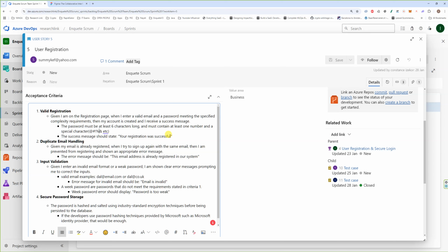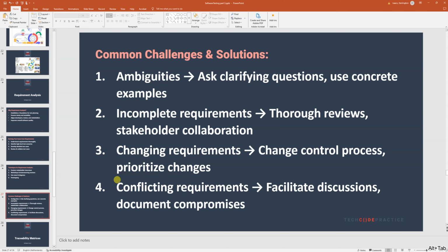You understand? To bring it back to Ifeanyi's freelance work, which I think I've discussed with you before. If someone has said, "This is the stuff we need in our website, we want this, we want that, we want you to put this here, we want you to put that there," and you write a proper document and say, "Is this actually what you agreed you want?" The person is like, "Yeah, yeah." You have to also make the person understand that should you come again tomorrow and say, "This thing should move there, that should move there, I want the database now to be two instead of one," it comes with extra costs. That is you performing a proper change requirement.